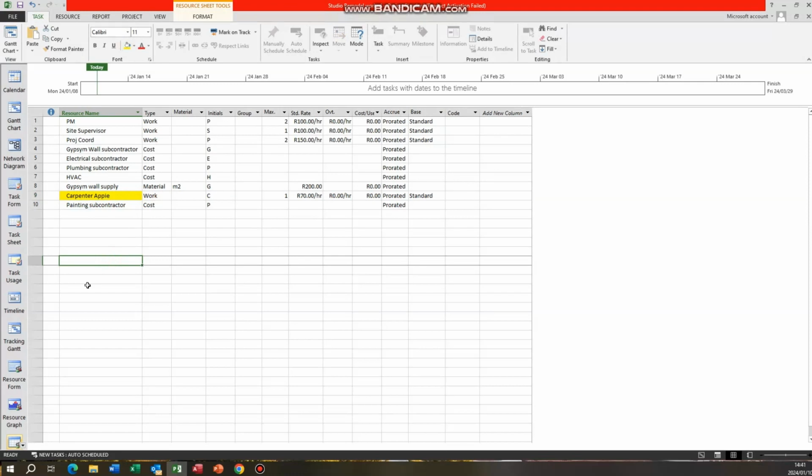That's fine, but we're going to create an alternative calendar, and his calendar, as far as I'm aware, will overwrite that. Okay, so he'll work on the new calendar, which we're going to call remodel, because remember, MS Project gives you only 3 standard calendars. We're going to add a 4th one, and his extra hour on a Friday, I think, still applies. We'll check that, maybe not.